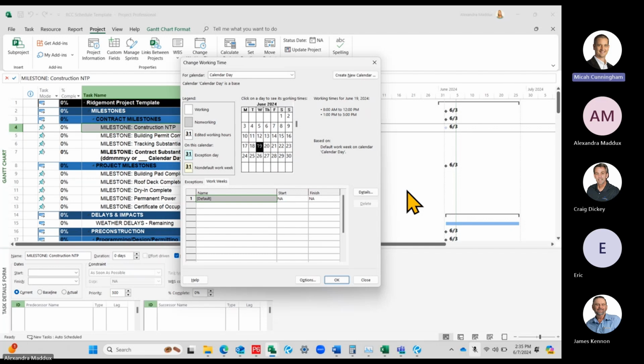So then does anybody know what you would assign this to? You could. So this would be what you assign to your contract days, like your contract date, so that your float values are measured in calendar days. So if you're behind, it's going to measure in calendar days. Also your cure activities you want to put on a calendar day so that it can cure over the weekend.